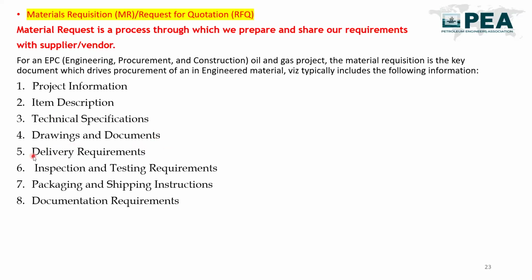After doing all these things, the delivery requirement we have to mention in our MR, like when we want to take this material from the vendor, what the inspection and testing requirements are which we need to take from the manufacturer, and what the packing and shipping instructions to the vendor are.